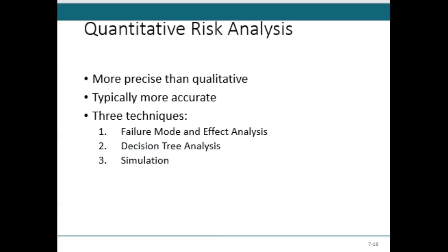Then, after qualitative risk analysis, today doesn't mean we stop watching. Remember I said you put every risk down on the risk register, my list of risks, because they can change priority over time. The qualitative analysis reprioritizes them, and then the top ones in that priority, the ones with the biggest probability and impact, are the ones we go down and do quantitative risk analysis on today, right? Those are not all the same.